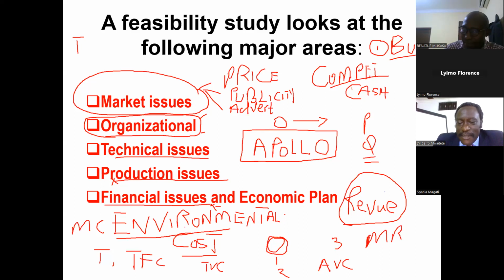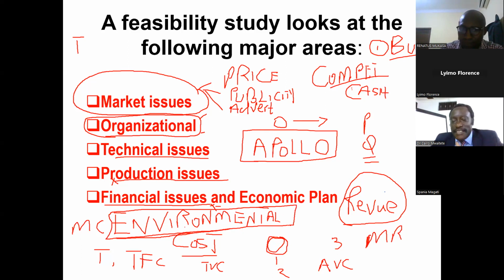Oh, yes, it's very much applicable. Environmental impact assessment, I think you will have to capture right here. It's written right here, environmental impact assessment. With these components, it's very important. If you are running a project that deals with mining, or you are doing construction, you must do an environmental impact assessment. You may use experts to assist you because, as I said, you cannot do each and everything by yourself. You must be smart. You are a manager. You need others to work in your favor. So the social aspects must be analyzed fully